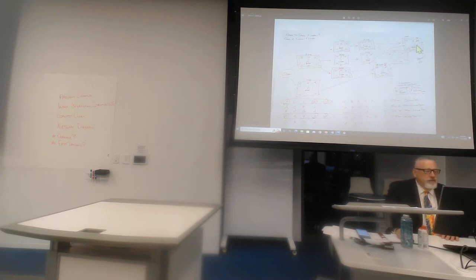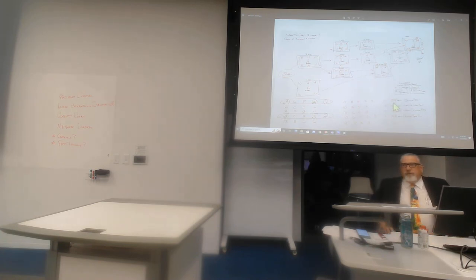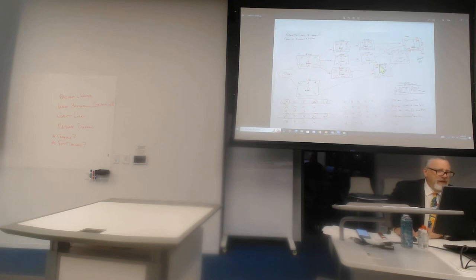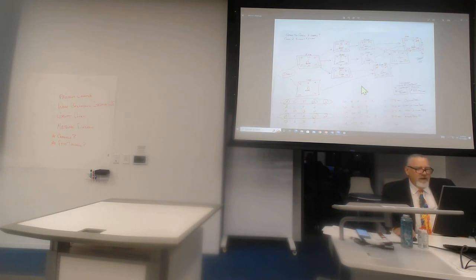Yes. There was a second critical path that was A, E, H, I, and J. So those two are critical paths because they both resulted in a 28-week time frame. We agree with that? If you don't agree with that, I'll post this up on Canvas, and you can refer to this drawing if you can interpret my scratches. I made some mathematical errors on problem example 2 that you helped me understand.